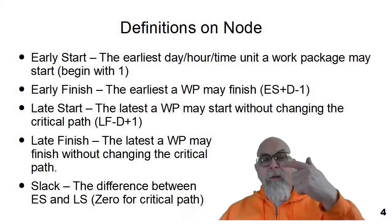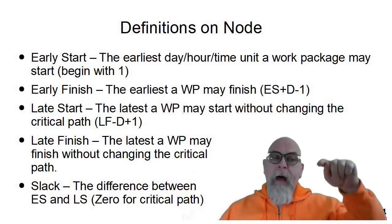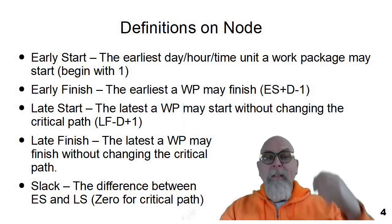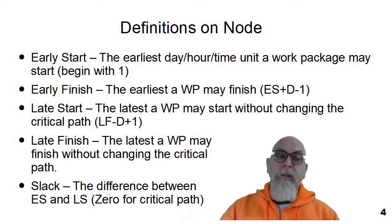Late finish, the bottom right corner, is the latest that a work package may finish without affecting the critical path. We use the late finish to calculate the late start. Late start is the latest that a work package may start without changing the critical path. For each node, it's calculated as late finish minus duration plus one.